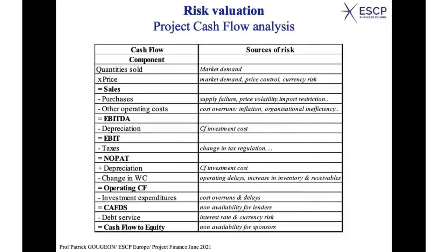But again, it depends on market demand. You may have a price control. The governments might intervene and decide to fix prices and so on. If the price is expressed in terms of foreign currency, well, you never know what will be the foreign exchange rate. You have currency risk. Okay, so the sales are uncertain.